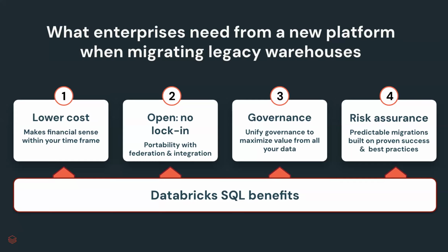I'll probably start. So number one, the baseline is always to set up the foundations, the comparison model. Of course, the customer is well aware of how much cost they currently carry, so it's important that we have this baseline. But number two, even before we approach a migration, we always try to collect all the data behind the existing complexity of their data estate, trying to have the metrics, understand the volume metrics and associated costs, and the projected future total cost of ownership on Databricks.